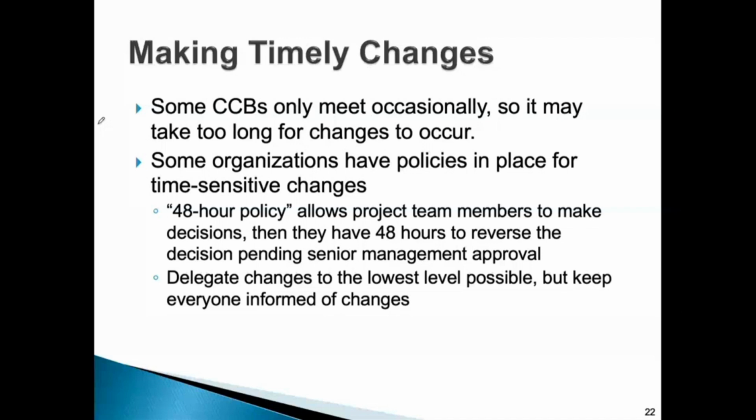But if you need to take a decision today or tonight, say you're building a building and there is something you have to do now, otherwise the structure will collapse, then what? I want to change, otherwise we will face problems. So here, many organizations have something called the time sensitivity change policy. They call it the 48 hours policy.